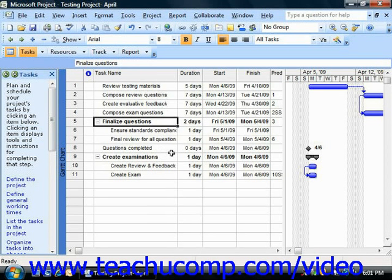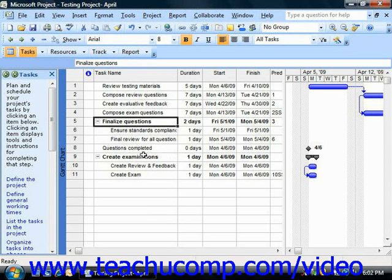Also note that you can link summary tasks together to note sequential phases in a larger project if desired. You can also link the start of a summary task to the completion of the last subtasks in the previous phase if desired. The scheduling of the tasks is performed by Microsoft Project the same either way.